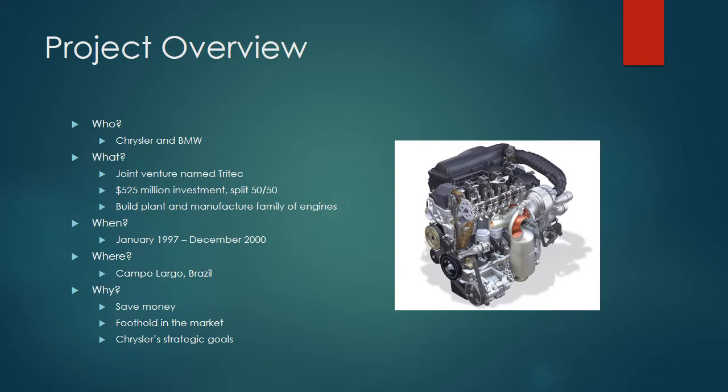Why did they go about this endeavor? Chrysler could save money by doing this venture as a partnership. It was prohibitively too expensive to do it alone. They could gain a foothold in an emerging market, which was South America and Brazil specifically. And it also matched with Chrysler's strategic goals, specifically the COS, or Chrysler Operating System, which was their approach to manufacturing.